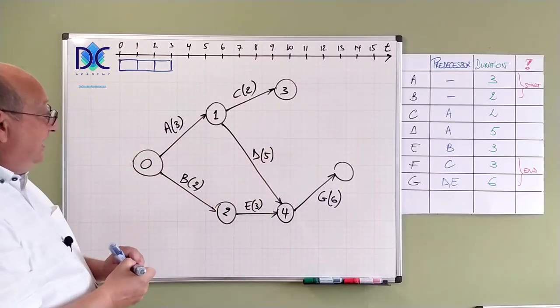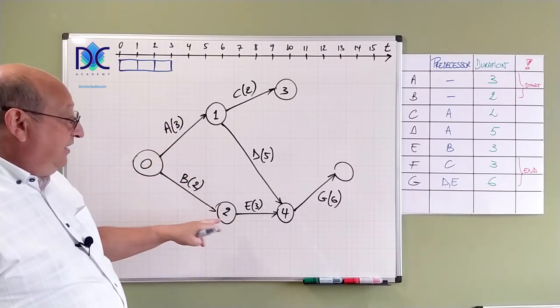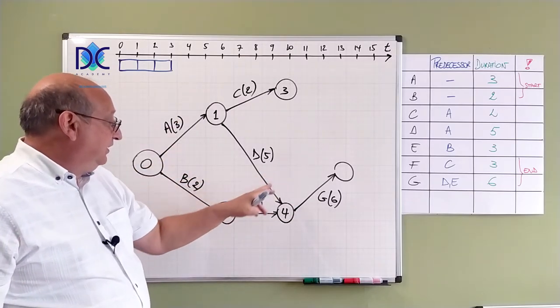And now I see in the graph we have A. D is after A. E is after B. And G is after D and E.